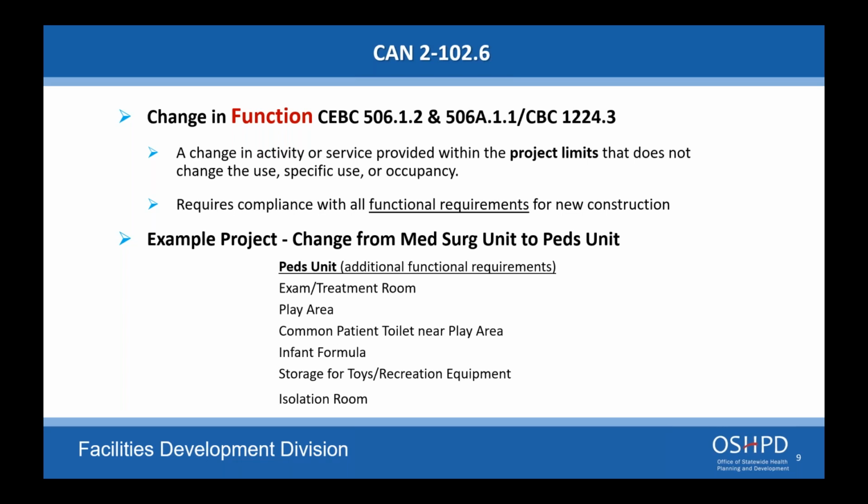In cases where temporary MEP equipment are needed for, say, a normal generator, chiller, or air handler alteration project and not an emergency replacement project, would the temporary work need to be submitted under a temporary work permit or submitted with a normal permit? Actually, it's your choice. You can do it either way.